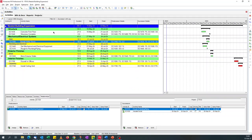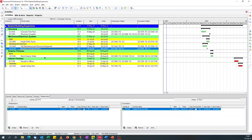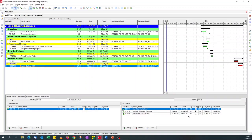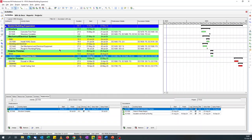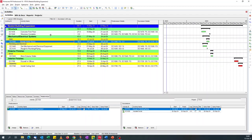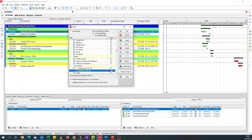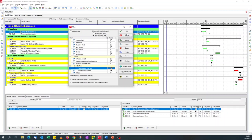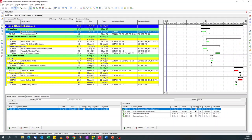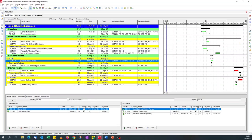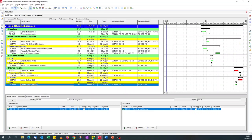Applying the successor filter, previously we had nine activities; this time we get eight where successors have lag. You can apply both filters together — but remember to change the criteria at the top from 'All' to 'Any' so that it works across all conditions. Combined, we now have thirteen activities in our filter.